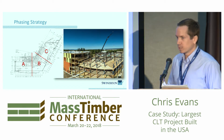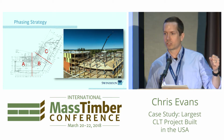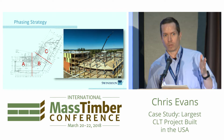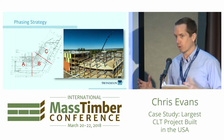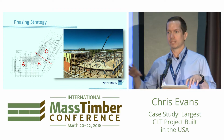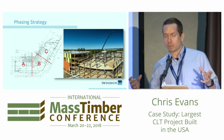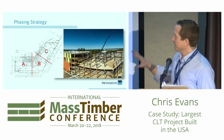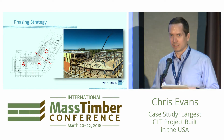What we decided to do instead early on in the process, because we had an end date constraint, we had to not only build it in 14 months, but we had to be done by a certain time because the owner had some holdover costs. So we divided the building up into 3 sections, 3 10,000 square foot plates, and we treated the building like a 15-story building. So we did 10,000 square feet in section A. We did the next 10,000 square feet in section A.